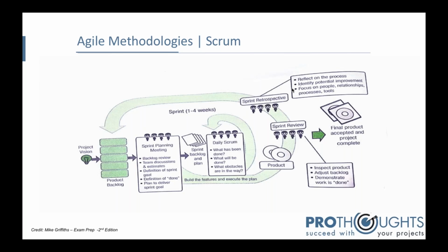It is an iterative methodology, and there are little differences in every methodology, but Scrum typically has shorter plans to execute. We call it a sprint. That kind of project is called a sprint project, which has a duration of 2 to 4 weeks, and the team is the decision maker, accountable. In this process, unlike in a traditional project where the project manager is the accountable person.